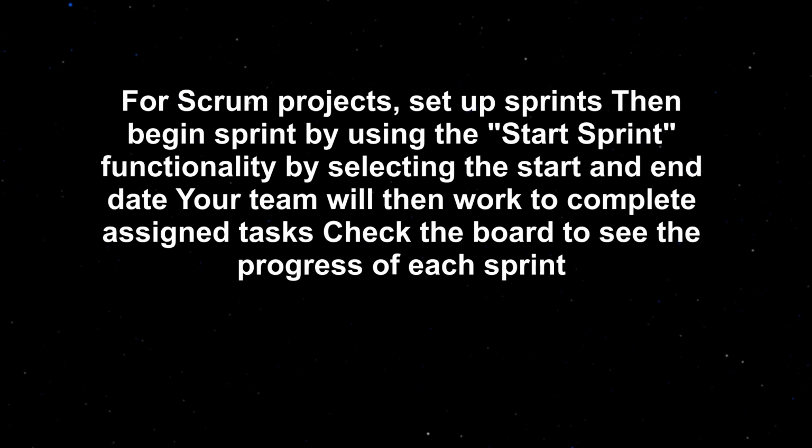For Scrum projects, set up sprints, then begin a sprint by using the Start Sprint functionality. By selecting the start and end date, your team will then work to complete assigned tasks. Check the board to see the progress of each sprint.